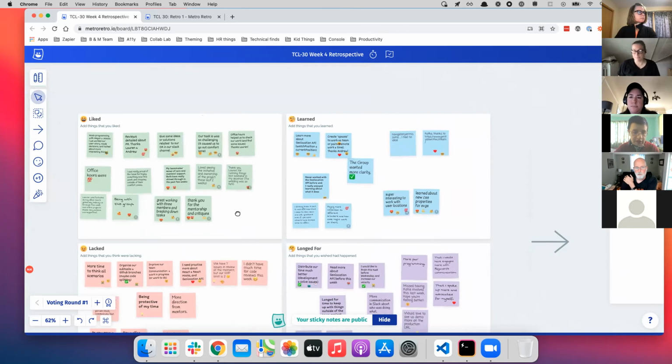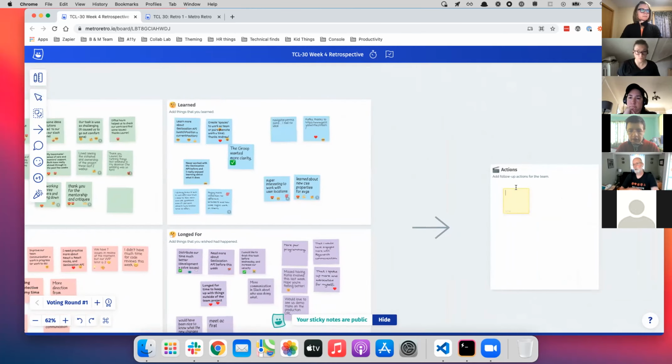Yeah, I have a couple of thoughts here. The first one, related to how we have 7 things in review, is a bias for done, if that makes sense. If we agreed on a work in progress limit for the review column, because if we have more than 2 things in review at any one time, it means there's a bottleneck somewhere, or in this case, I think we were producing PRs.